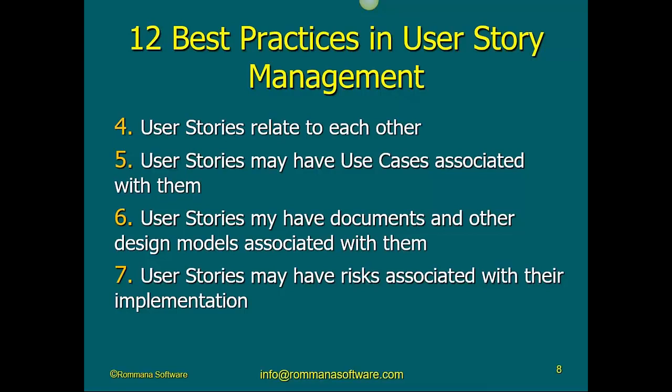And in an agile project using user stories, we seem to overlook those risks. We seem not to document them at all, and we get a surprise in the middle of the road that we cannot deliver this user story because we were relying on third-party software or a component that was supposed to be acquired, but that component is no longer available, whatever it is. Those are what I refer to as project risk that relates to user stories.